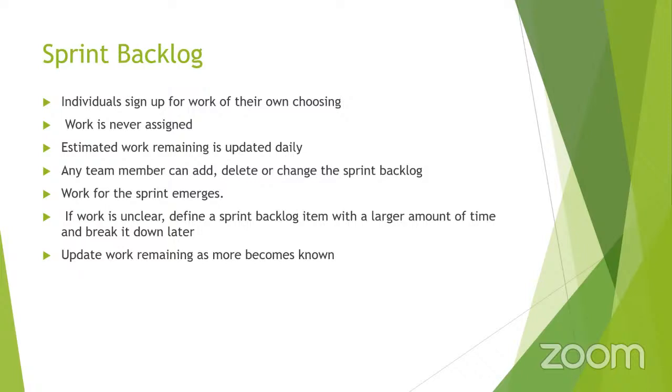Individuals just sign up for their own work, and work is generally not assigned. If you are doing the testing this time and then you want to do development in the next sprint, you can go ahead and do it. You also estimate the time. Whenever we take a story, we say that this story is going to take 3 days for me to complete. And by the end of the day, if you made significant progress, then that 3 days can be changed to 1. Any team member can add, delete or change the sprint backlog.